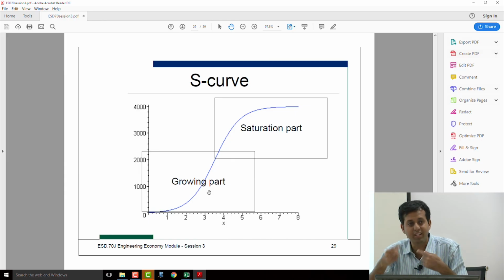And if I can put in flexibility where some input parameters, some investment parameters, can be staggered based on my discretion, that's the key part. It's staggered based on my discretion. When I did 1, 2, 3, I had no discretion. It was being done irrespective of whether I liked it or not. But when I can actually stagger at my discretion, that means I have an option to do something. Then what would the increase in NPV be?